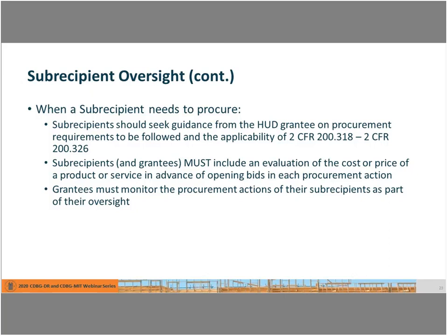The key here, and this is a point that has evolved significantly in more recent years, is the evaluation of cost and price of a product or a service in advance of bid opening. And when we monitor this, we need to see that documentation was developed in advance. It can't be done after the bids are received. It must be done before the bid is issued, okay?